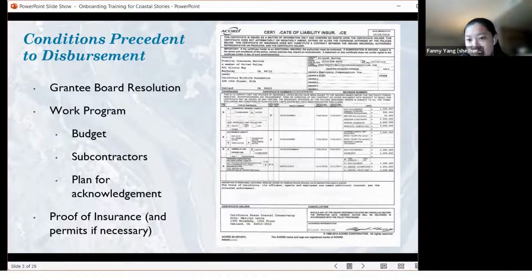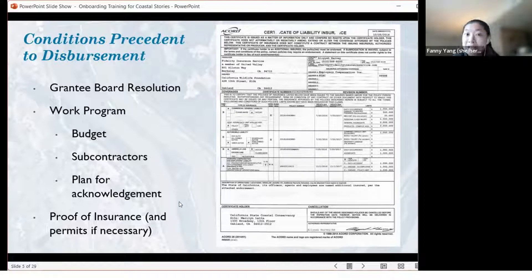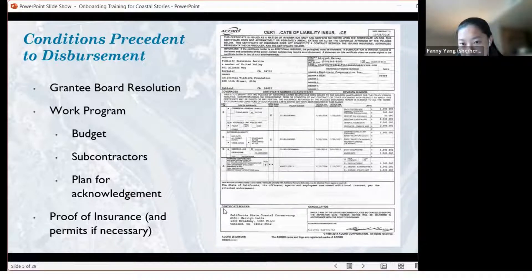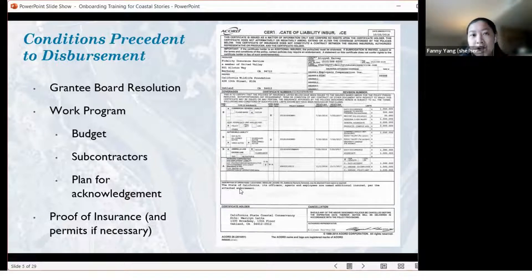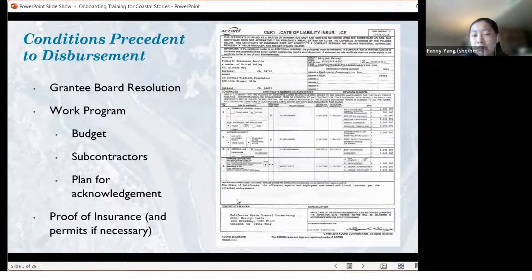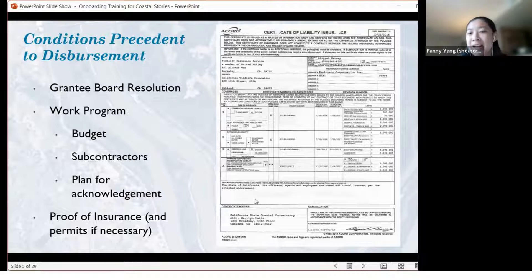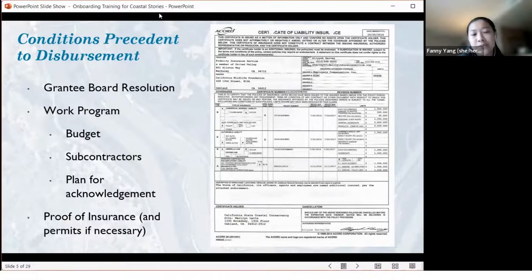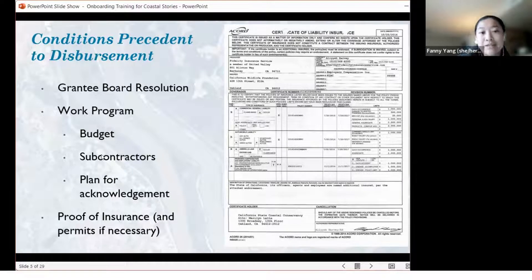Importantly, the certificate holder at the bottom should be the California State Coastal Conservancy. What's also really helpful is in the description of operations box — above the certificate holder portion — you put in the project name and the grant agreement number if you have it. If you don't have the grant agreement number yet, given the large number of grants approved at our last board meeting, you can also put in the project number.